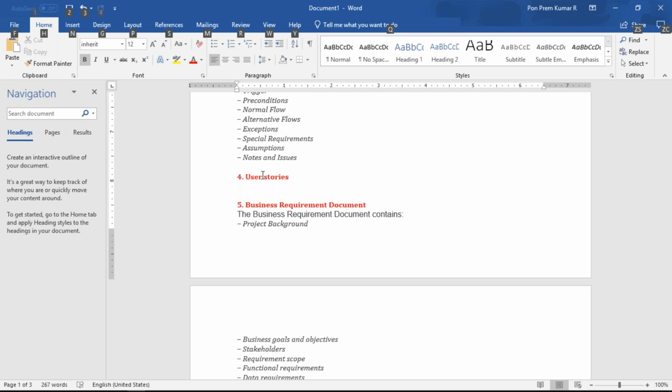You are the BA who will be coordinating between the client and the IT team. At the time, the requirement which I have given is an epic. Epic means I have just given you a vague requirement. I'm just asking for an e-commerce site for my products. You have to break it down into multiple user stories. Initially you have to see web development is one phase, product listing is another user story, transaction is another user story.